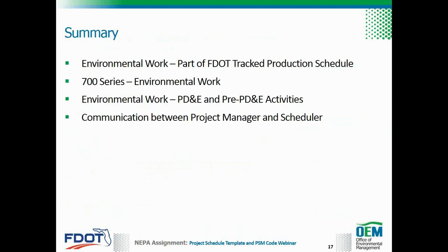So in summary, I want you to take away 4 items from this webinar. Item number 1, FDOT management has decided that PD&E and pre-PD&E activities will now be part of the track production schedule. Item number 2, to accomplish this, new PSM codes have been added, and now the 700 series is reserved for environmental work. Item number 3, that environmental work now includes PD&E activities and pre-PD&E activities.